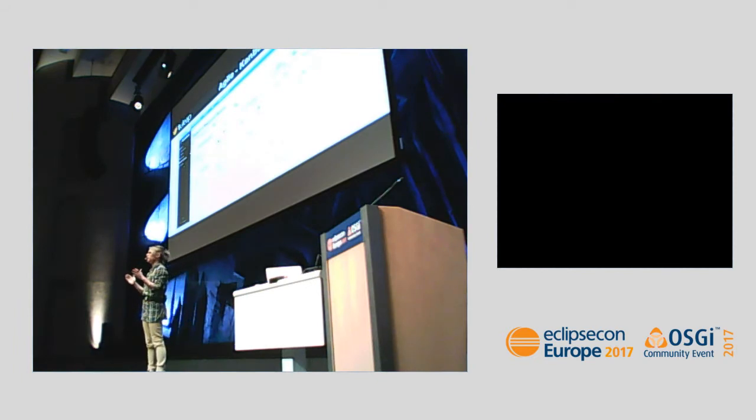This column is really important. You can limit the number of cards per column. I would be happy to start a new thing, because I have to be honest, I like starting new things. But for my team's health, I have to help my colleagues finish already open tasks.